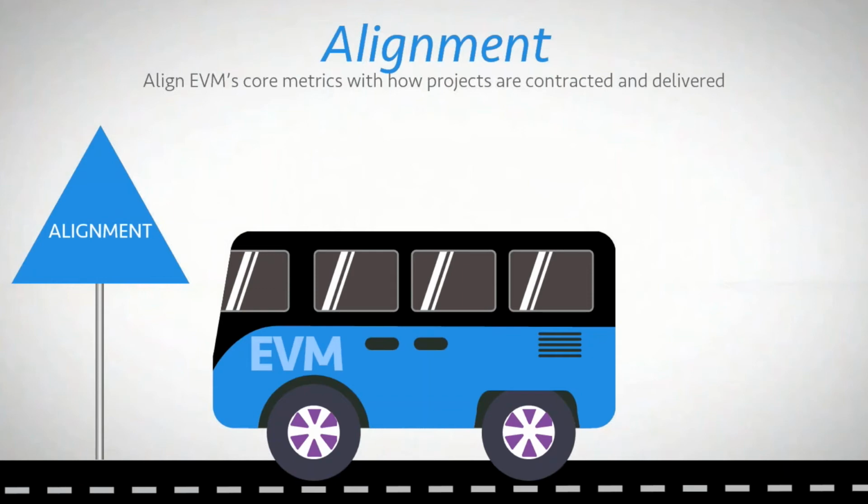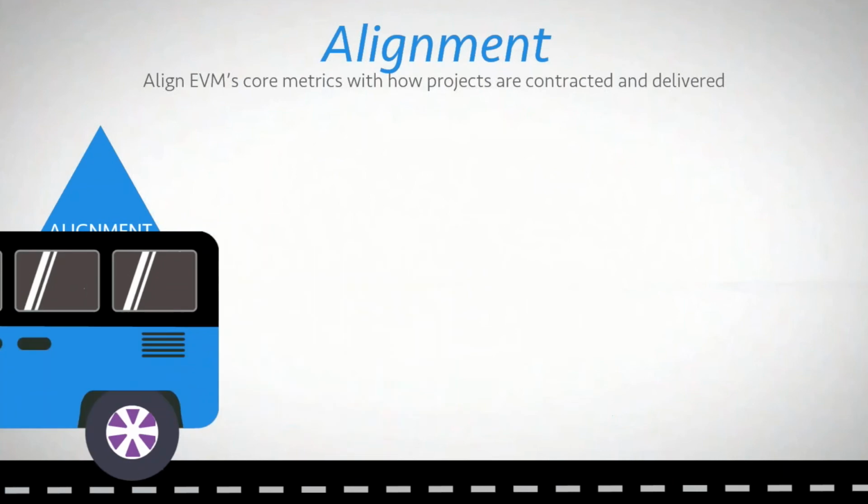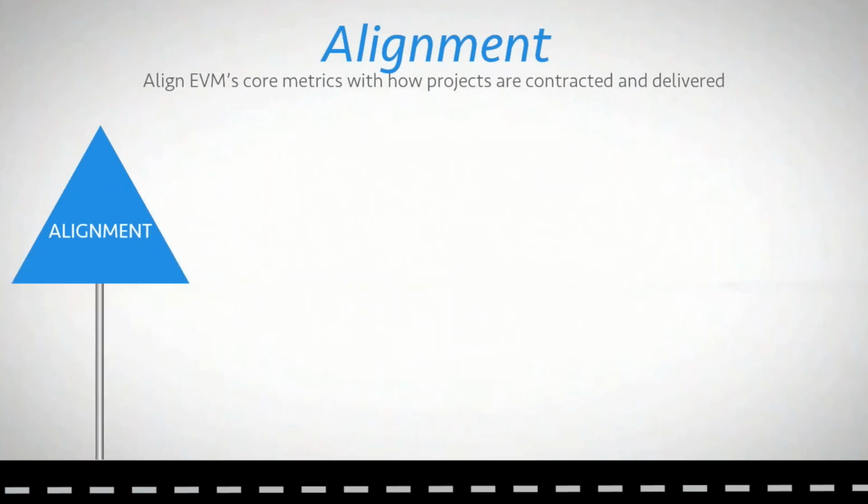Different consultancies have different needs, including which combination of EVM's financial and schedule metrics are useful. As you identify the mix of metrics for your firm, consider goals and variance thresholds for each selected metric. For example, if effort performance index is important, define the upper and lower limits that dictate whether a project needs further focus and attention. By defining these thresholds, you start to establish how earned value management will fit into your firm's project management methodology, and also help bring along those folks in your firm who might need some further convincing. Speaking of methodology, this is a good segue to our next stop.